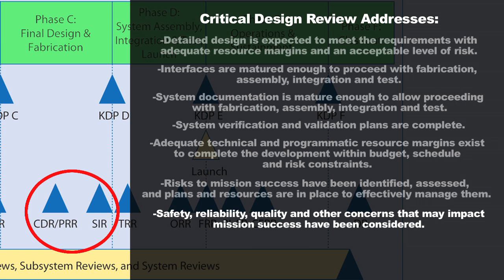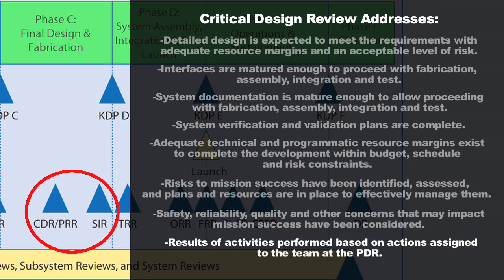At the end of the Critical Design Review, the review team is going to want to know: did the design team look back at all the Preliminary Design Review actions that were assigned and close them all out to the satisfaction of the review team? That closeout of prior actions will be one of the factors reviewed at the Critical Design Review.